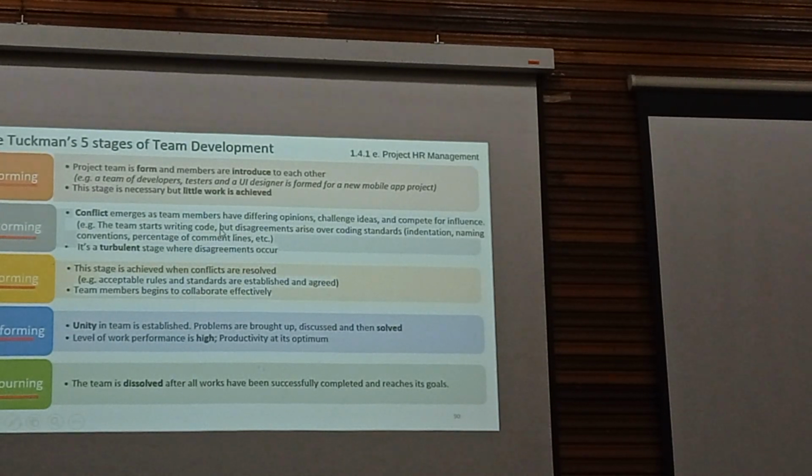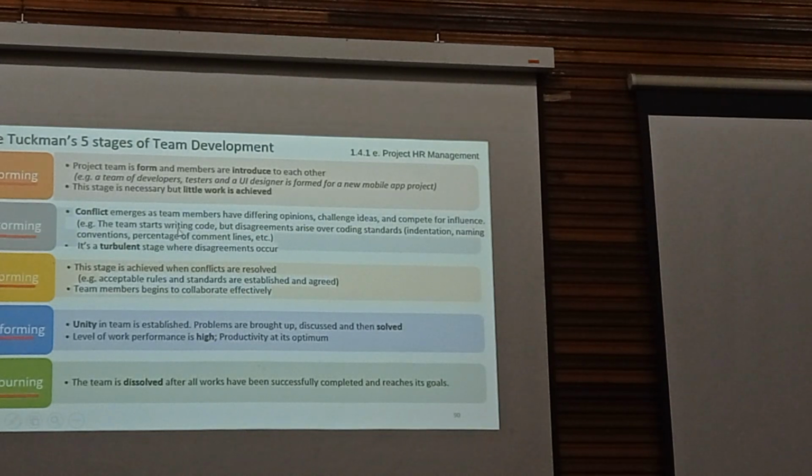If conflict is not solved, you cannot go to the next stage. If conflict is not solved, productivity will be low. If productivity is low, meeting the project deadline will be difficult. So any conflict that occurs in the team must be resolved.